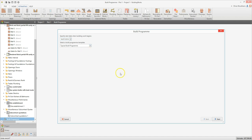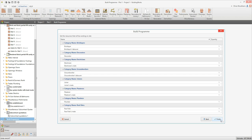The next dialog box asks you to enter the number of labourers who will be working on site. Click into the quantity column adjacent to the labourer type and use the arrows to increase or decrease the number to match the gang sizes you will be using. These gang sizes are used to calculate the length of each build phase bar in the bar chart based on the information contained in the estimate. Once you have updated your gang sizes, click finish.